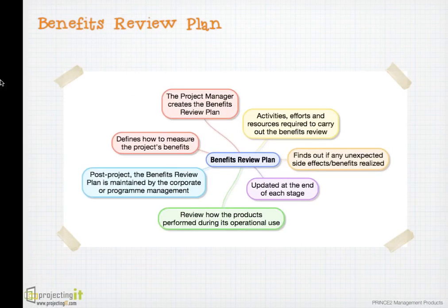Benefits review plan is prepared by the project manager at the time of initiation. Benefit review plan tells how the project benefit should be confirmed and reviewed, who is accountable for conducting the review, when the project benefit review should take place, what will be reviewed as part of benefits review.